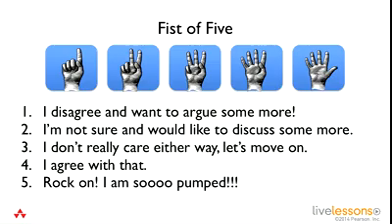If you ask for feedback and you do a fist of 5 and you get all 3s, I'd probably still have some discussion. Are we just moving on because you're tired of talking and we really don't have a consensus? Are there some trepidations? Let's see where we are. You get all 1s, you know you've got a problem, need to keep discussing it. So this is something you can use in many areas when your team is having contention.